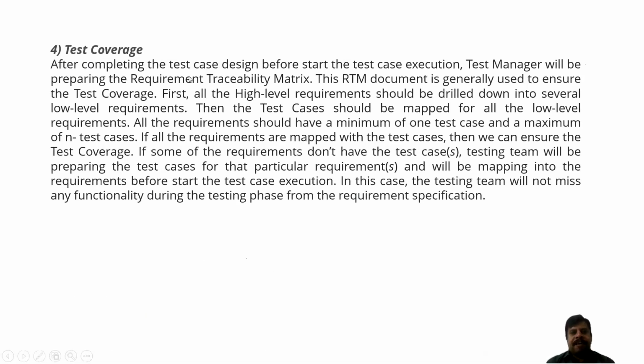Next, test coverage. After completing the test case design, before starting the test case execution, the test manager will be preparing the requirement traceability matrix, which is known as the RTM document. RTM means requirement traceability matrix. So this RTM document is generally used to ensure the test coverage.